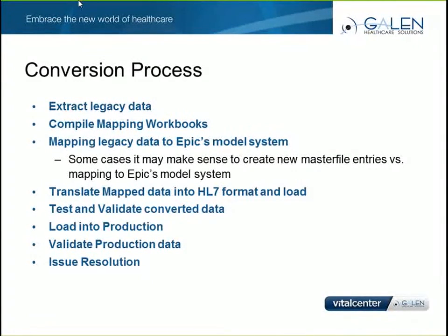Sometimes how reference range or common information is converted as free text or appended to the result value, it can clutter up these tools, which sometimes results in losing the discrete data functionality within Epic. It is important to make sure you get final sign-off from your clinicians who are able to validate the converted data. Now it's time to load the data into production.